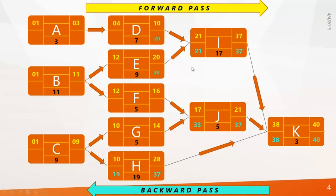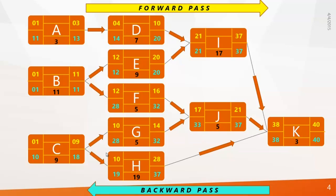At the third level in the backward pass, use the same equations to find late start and late finish. At the final level, look at activity C — it is connected to G and H, which have late starts of 28 and 19. Remember: in the forward pass we chose the longest duration and added 1; in the backward pass we choose the shortest duration and deduct one. So the late finish of activity C becomes 19 minus 1, which is 18, and the late start of C is 18 minus 9 plus 1, which is 10. Calculate B and A the same way.